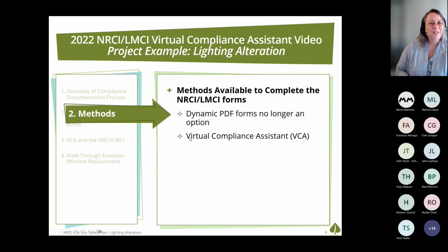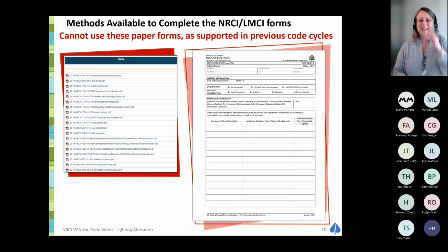So there's more than one way to skin the cat, shall we say, but there's one way that's better and there's one way that's bad. This is one way that's just not available anymore. This is the old school certificate of installation form, which is a paper form. It basically said, hey, contractor, tell us what is the date of the certificate of compliance form you used to base your install on. So the contractor is always to be aware of what was promised in the certificate of compliance, and please document anything that's different than what was promised in that certificate of installation form.